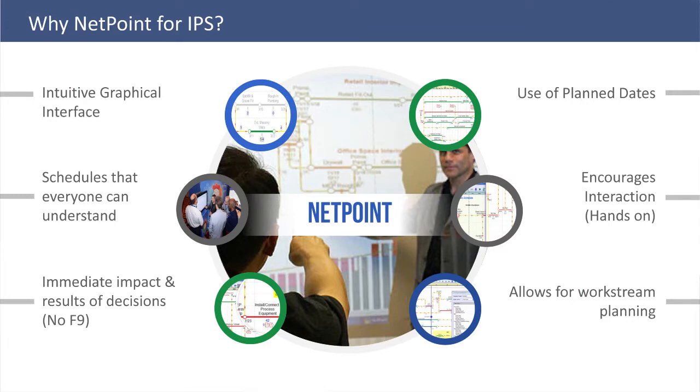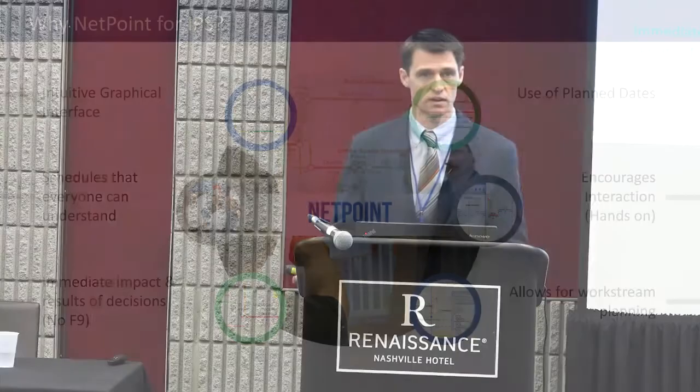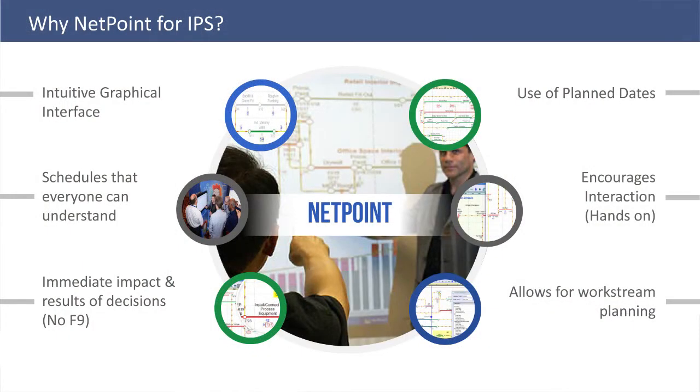Why are we using Netpoint versus P6? We have found, and I think you would probably say the same, that thanks to the graphical interface and the use of plan dates, planning sessions really can get the buy-in and support from your audience when they feel like they're part of the process. It encourages hands-on interaction, getting people up there, touching the screen, moving things around. The use of plan dates makes it feel like their own versus an early start date. I know I'm not going to start that for 3 months. Why does that scheduler keep telling me my early date is next week? I'm not going to do it next week. When they feel like it's part of their plan, they're part of the team. They buy in and they support it. The whole F9 item, you know, the immediate impact.